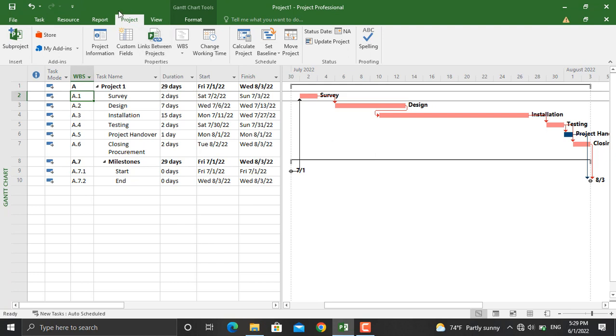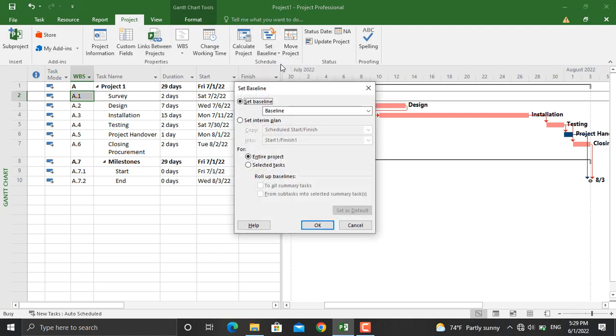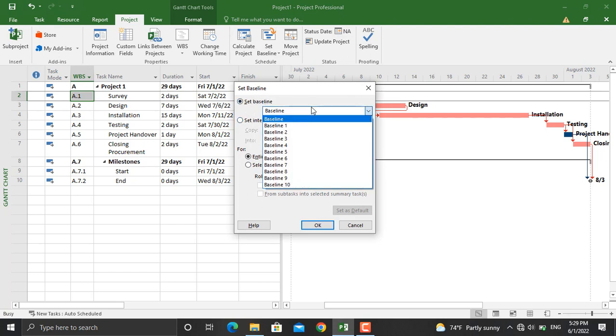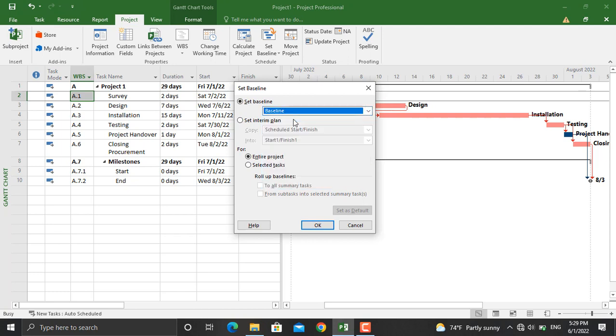To set a baseline in the project, go to Set Baseline. From here different options will be given. You can choose any of the baselines. You will click Baseline. And for the entire project, if you have some selected tasks and you want to assign a baseline only for them, you will select the selected tasks.